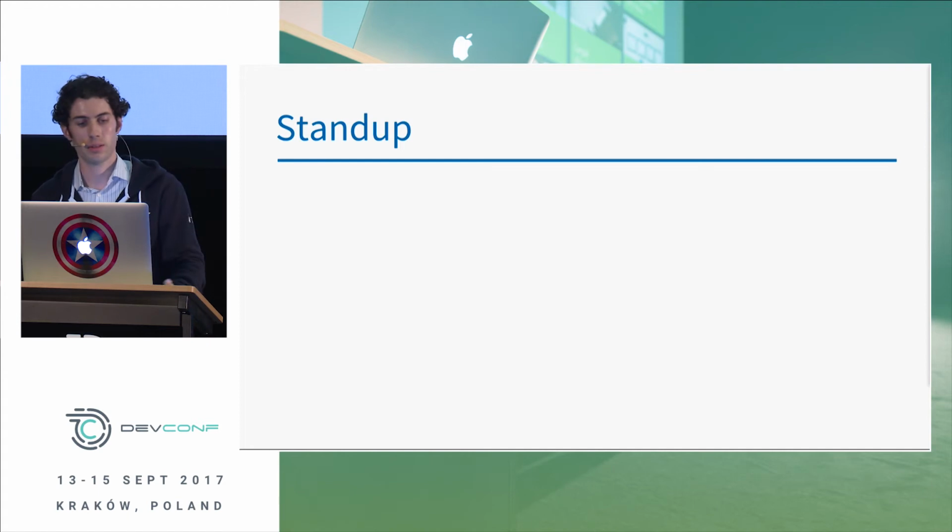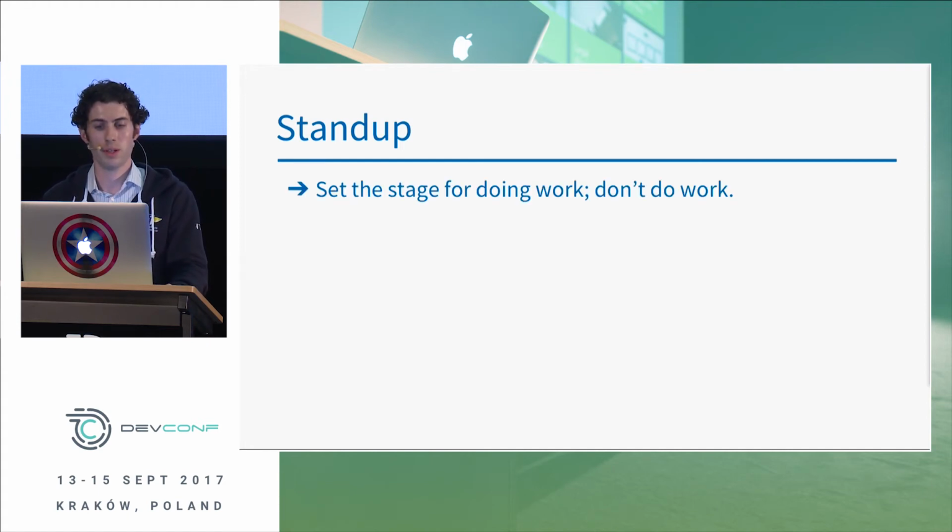Stand-up is a fact of life for many teams. And the most important thing with stand-up is to set the stage for doing work and not actually do the work. The idea is to identify blockers and to see what meetings you might need to have with people or sync-ups, and not to solve problems in that meeting because it's very short and it's unlikely that everyone in the team needs to be in on it.